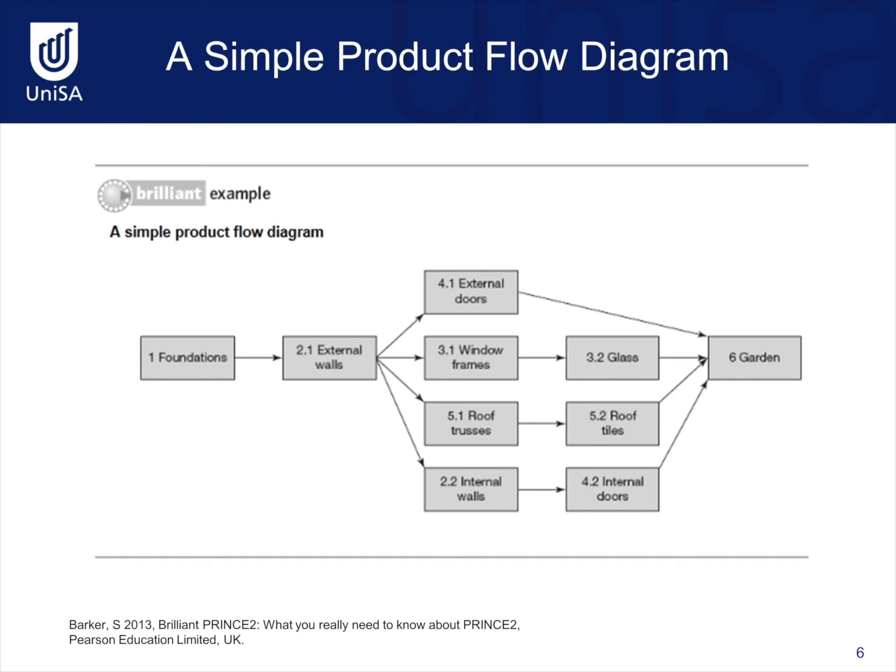So you can see we start off with our foundations. We then build our external walls. Then a few things can happen at the same time. So if you are a builder or a project manager, this is really useful because it can tell you the sequence in which things need to get done.